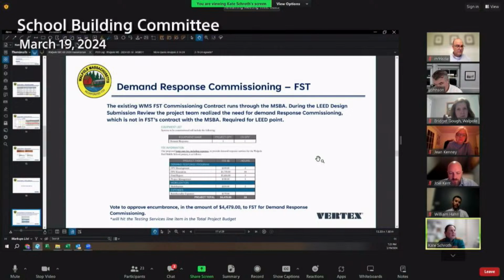So the demand response commissioning with FST. We currently have a commissioning agent on the project for both MEP and envelope, which is FST. They are hired by the MSBA, so the FST contract is directly with the MSBA. And through our design lead submission review, it has come up that we are going to need commissioning for the demand response system for the building, which is not currently in FST's contract with the MSBA. So this is a proposal to bring FST on board directly, not through the MSBA, to do the demand response commissioning in addition to the rest of the commissioning they're doing for the project.